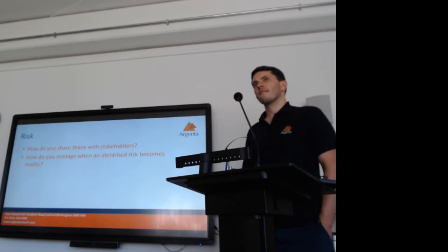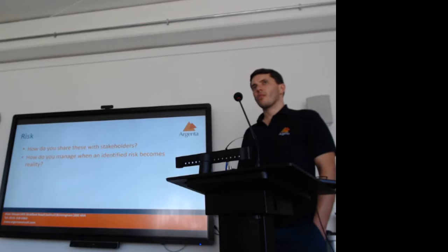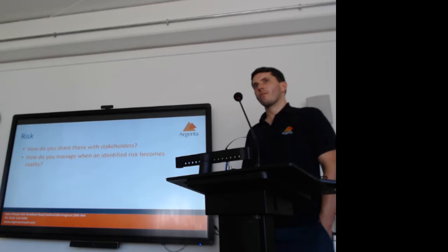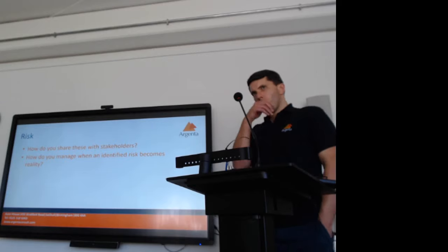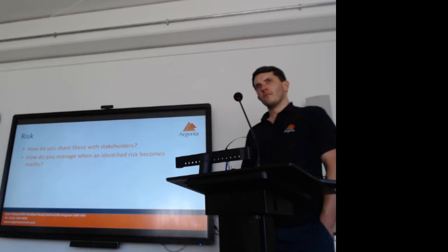So it's like severity, frequency, and occurrence. So you multiply those scores together and you get a number which is like a risk index, if you like, and if it's above, you choose 90 or 100, you need to eliminate it or address it in the design. If you can't address it in the design, then you have to put a method in place that will check for that risk at assembly stage. So that's one of the tools that we use.